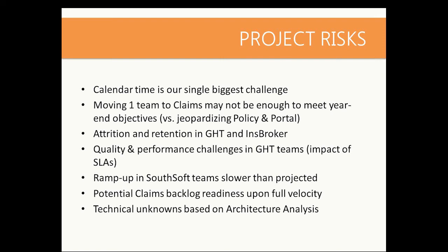And in general, when I start up with a team, whether it's distributed or not, but we're talking distributed, so let me take that as an example, the first 3 months, I don't count on productivity. That's not to say that there isn't productivity, there definitely is, but this is the moment where the team changes a lot.